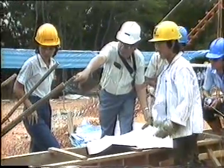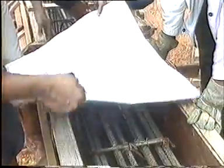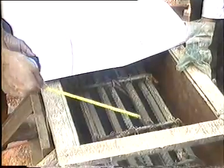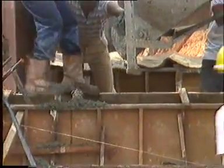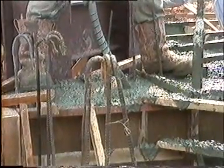Quality control was stringently enforced by a construction engineering committee comprising a few lecturers. Here, you see a staff member checking on the correctness of our steel reinforcement against the design drawings. After the formwork for the tie beams has been checked for size, spacing, and cleanliness, it is now ready for concreting. By now, we have more experience at concreting and are able to keep a consistent level of workmanship. We are more efficient in using the vibrator to compact the concrete.